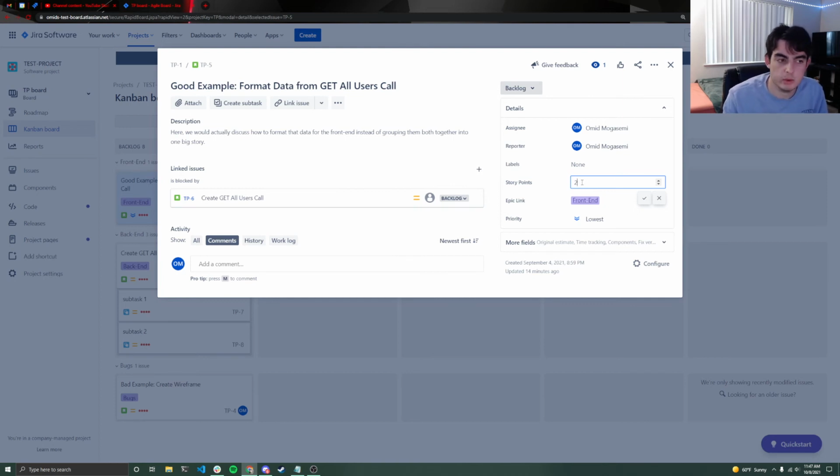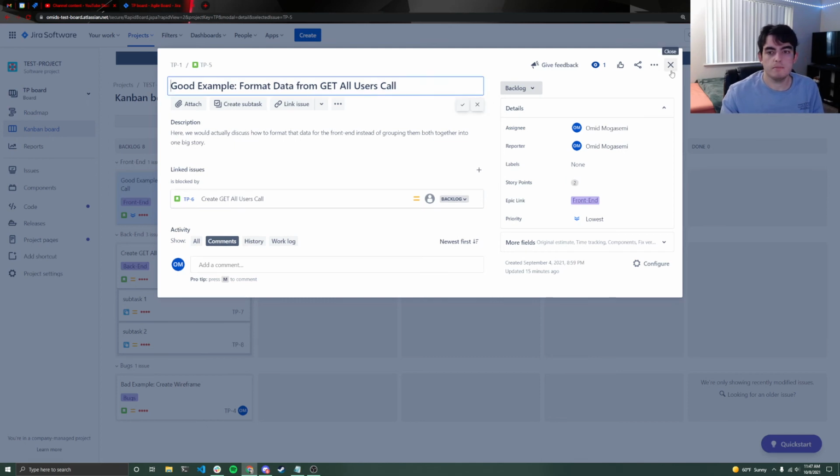Okay, this guy has 10 hours. I'll give him a story with 10 story points. Easy. Or I can break him up into a 5 and 5, 6 and 4, so I can meet his 10 hours before that week starts. It just helps you manage and oversee and make sure that no one is doing too much or conversely doing too little. So that's pretty much that.